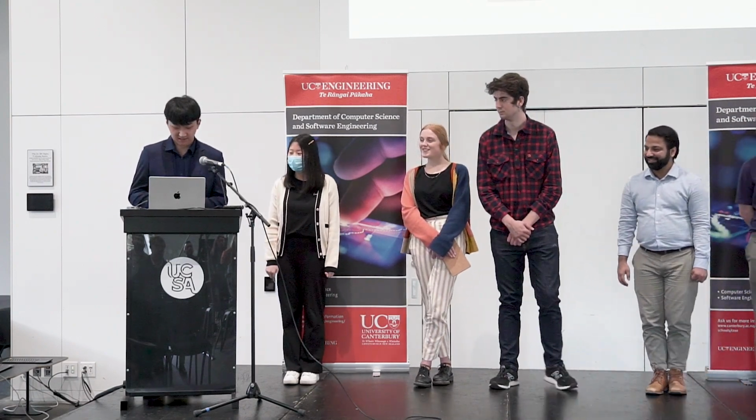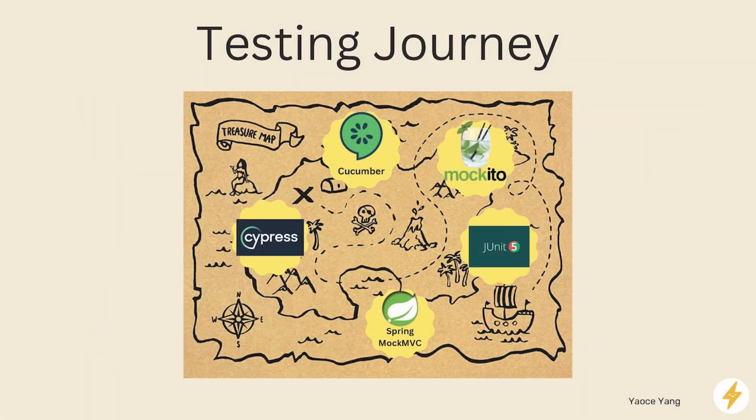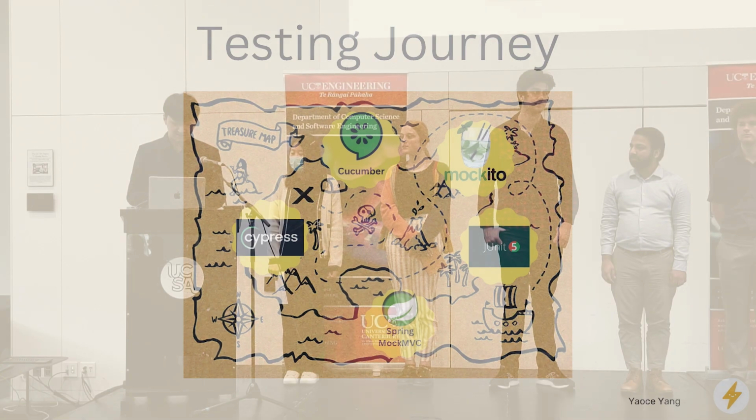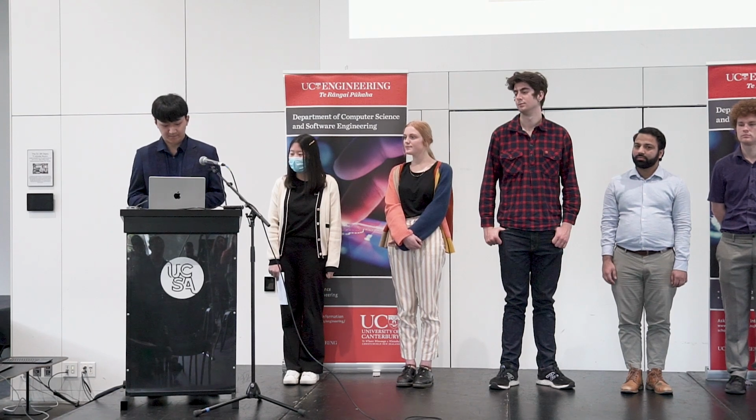One of the biggest challenges we initially faced as a team was testing our product. At the beginning, we struggled with testing as we found writing good tests hard and had poorly documented manual tests. As we progressed throughout our sprints, with little testing done, we started to discover more and more bugs, which caused us to fail a lot of our committed stories.